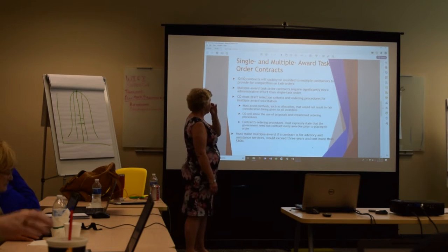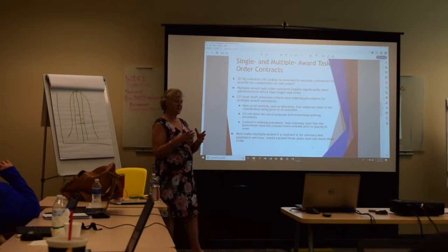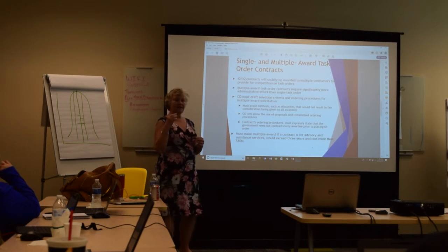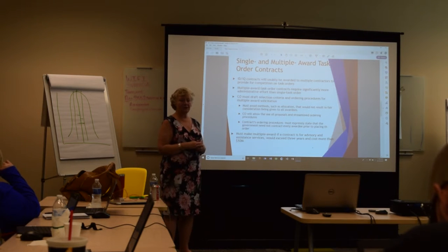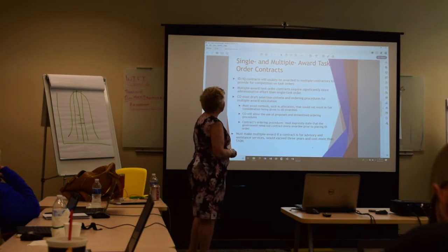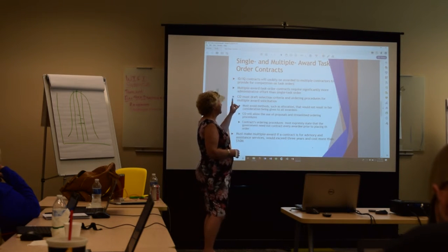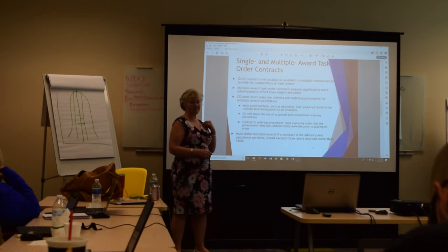IDIQ contracts will usually be awarded to multiple contractors, so that's the whole reason why they have IDIQ, because if they come up with 3 requirements right away, you as a small business may not be able to do all 3. So you reserve the right to not bid on task orders within this IDIQ, but then other companies that have been selected can bid on them. They require significantly more administrative effort than a single task order.